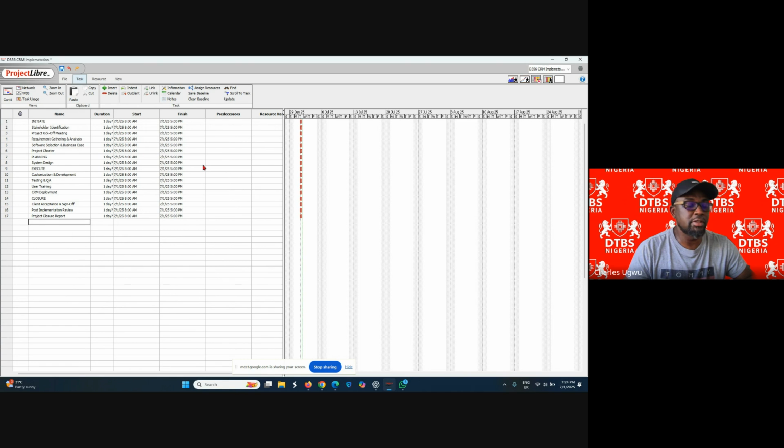But here you can see that even on initiate, which is a stage, it assigned a day. So what we need to do is make these key stages stand out, and we're going to use what we call indents, or outdents, to do that. We select all the items under the initiate stage and we indent them.